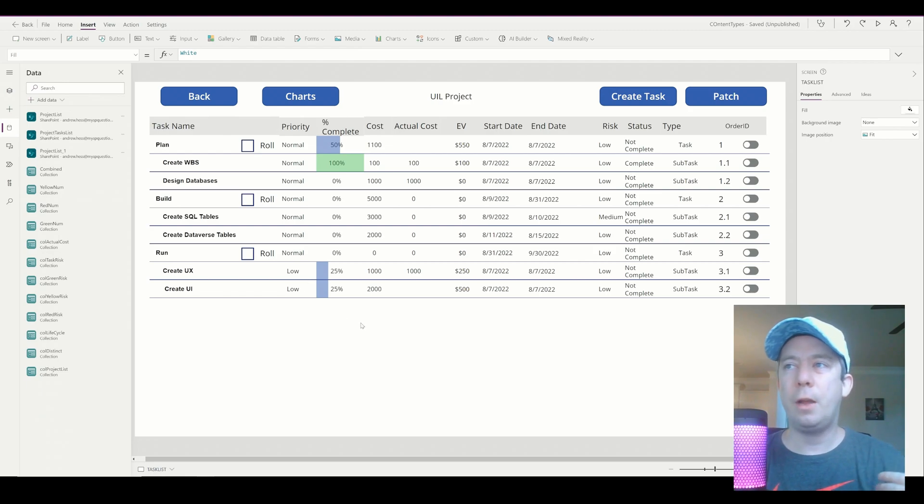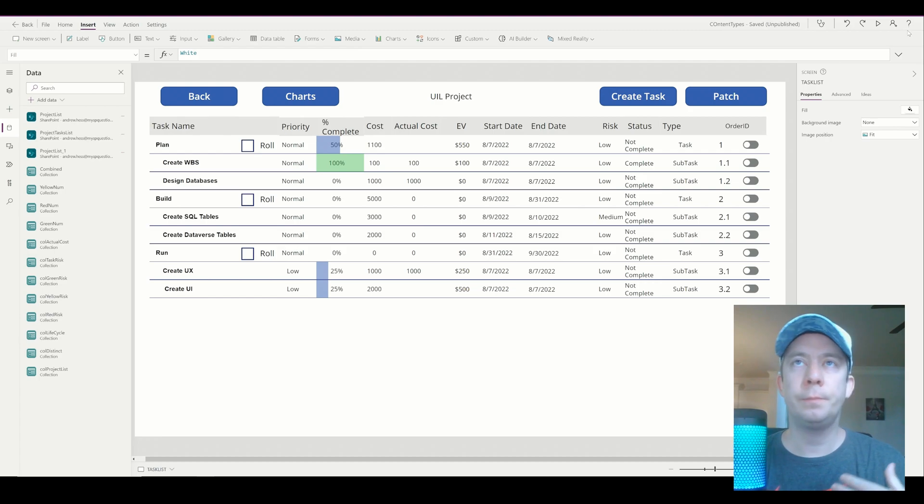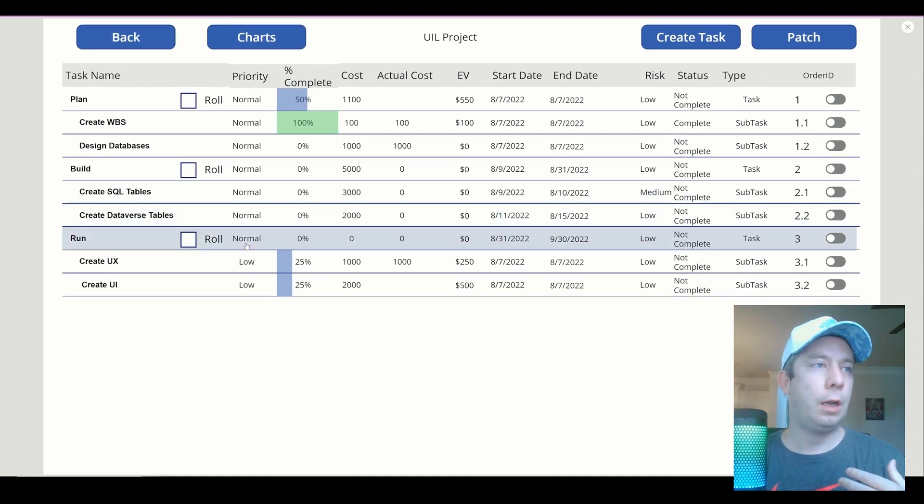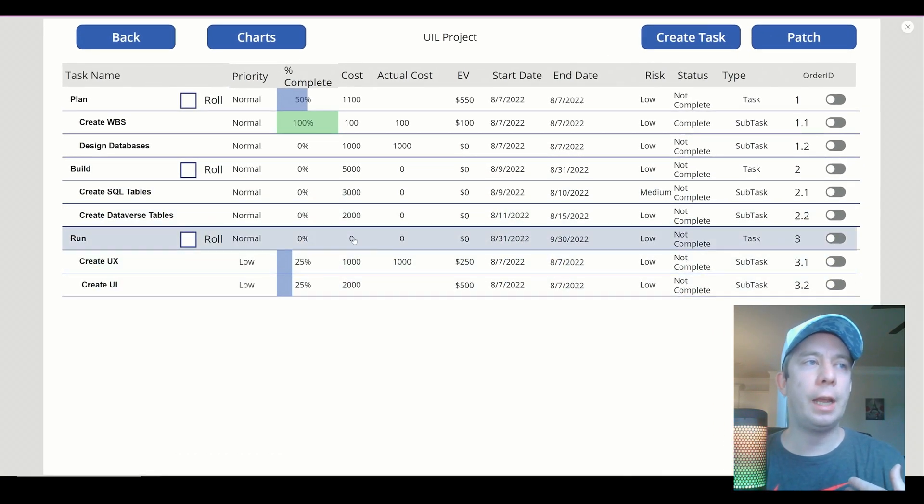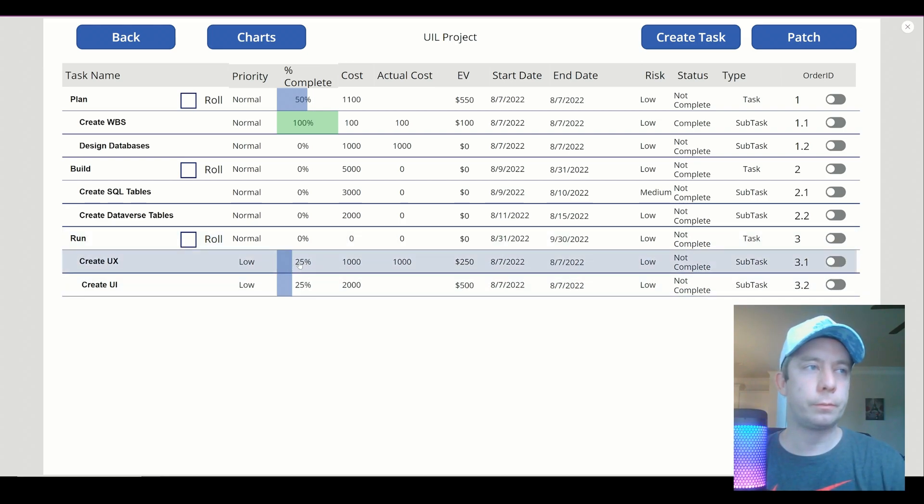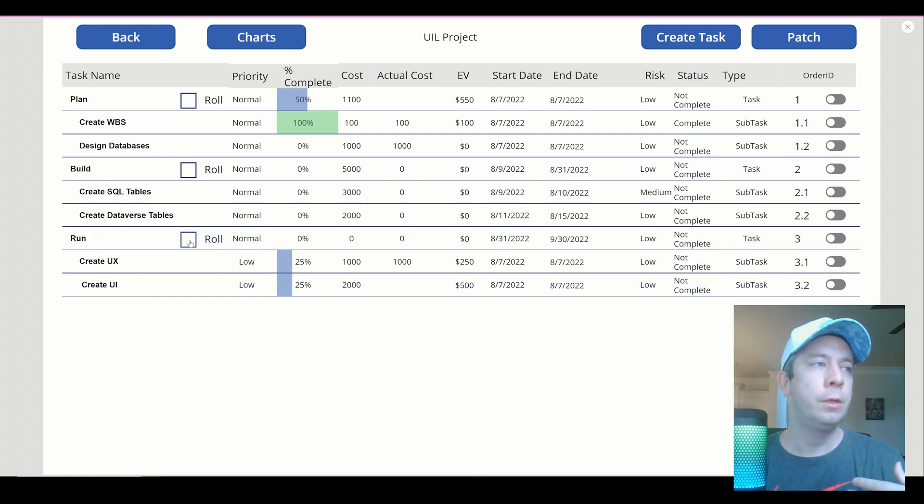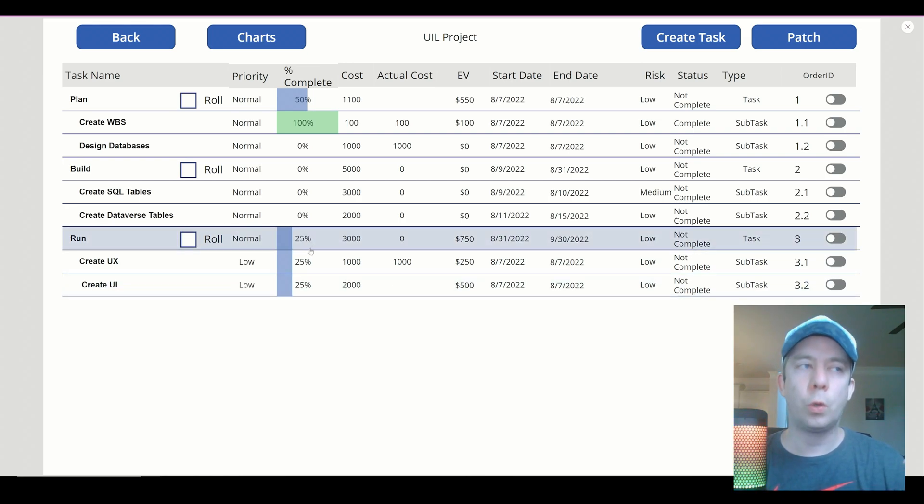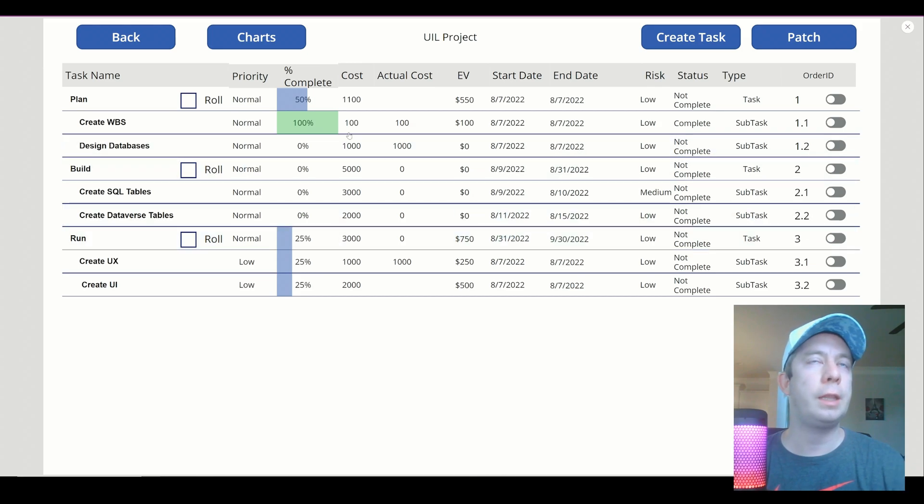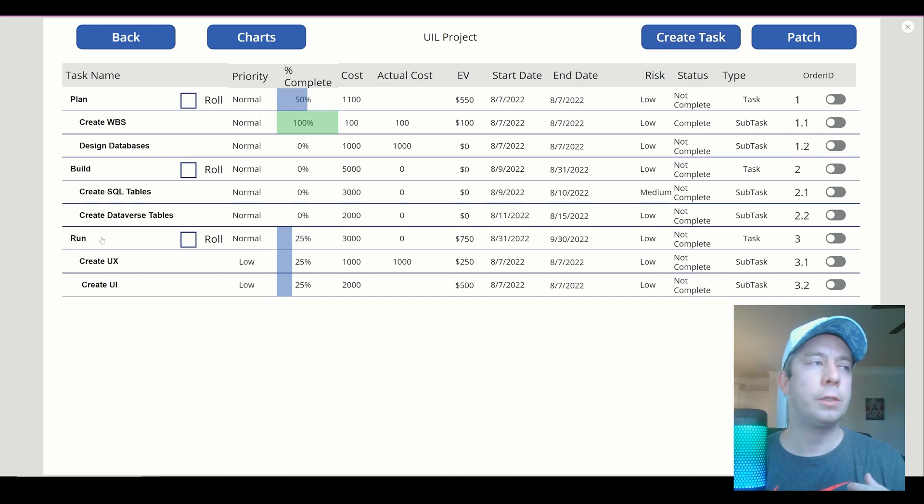Now that we have this roll button, roll checkbox here, when we roll up, we should have 3,000 in cost, and we should have 25%, right? Because the average of two 25% should be 25%. So we'll hit the roll button, rolls up, we got 25% and 3,000. Let's create one more task just to double check.